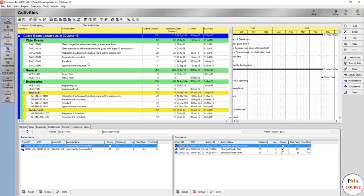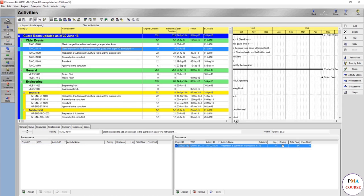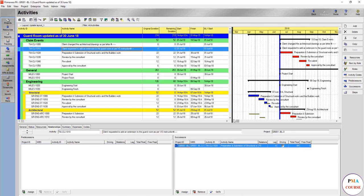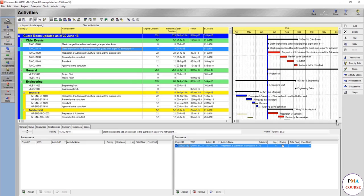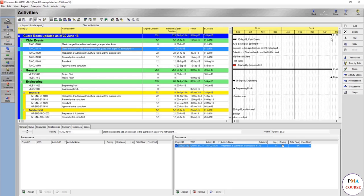There's a lot can be done here. There is a way, a lot, and there is a lot of different schools. Here, you have submitted a claim event. Once it treats you to 179 claim events, you can imagine that I have 179 claim events and I had to study each and every one. And I also recommend to add a bar here and write original duration and then the affected project duration. In such case, this will show much clearly what's going on to your project and how much it was like for January, then it's extended to April.